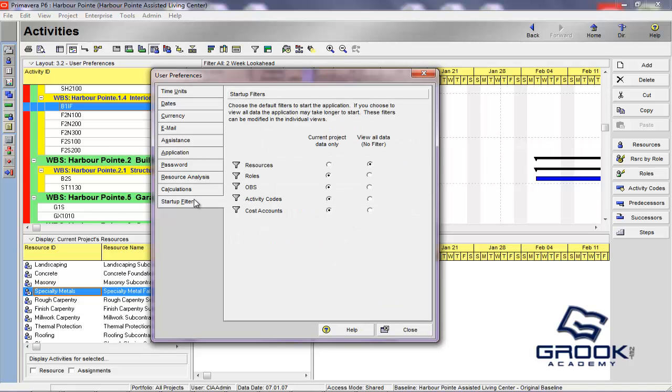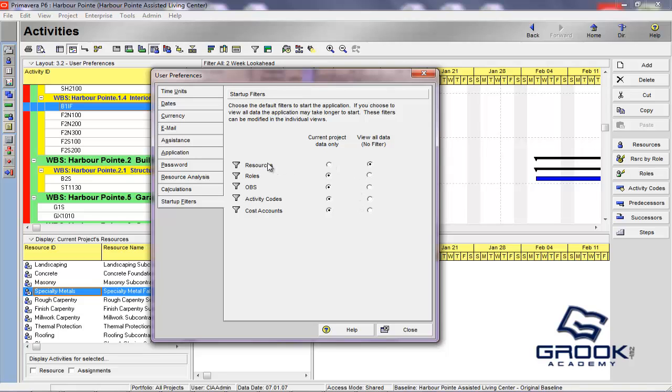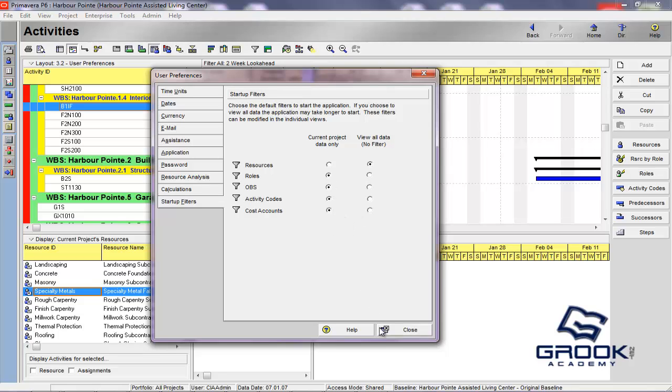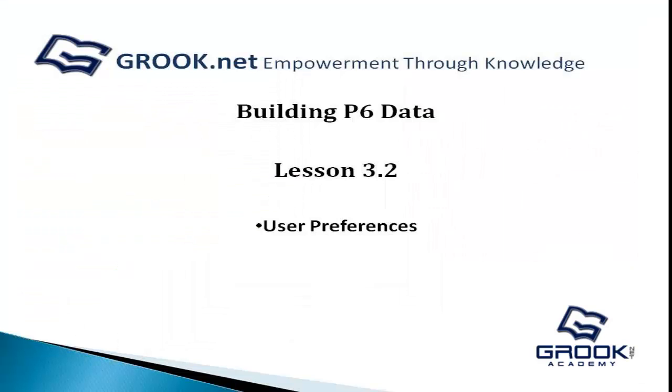Now, the startup filters are going to allow you to choose the data filters you want to run when starting the module. Now, you can choose to view data for your current projects only, or all data in the database, and these filters can reduce the time it takes for your projects to open. So, basically, you're setting the scope of the data that you want to see when you're opening a project. You can, like, for instance, here for resources, you can say I want to see all of the resources, even though I'm only looking at activity codes and cost accounts and the roles and OBS for the current project that I have open. And because if you were to come in here and click all of these, it would take much longer for your project to load when you opened it. So, that is a general overview of the user preferences in P6.